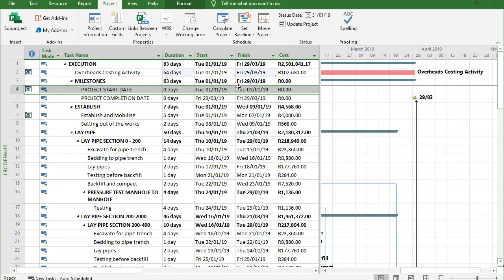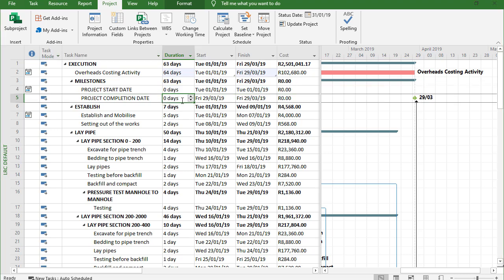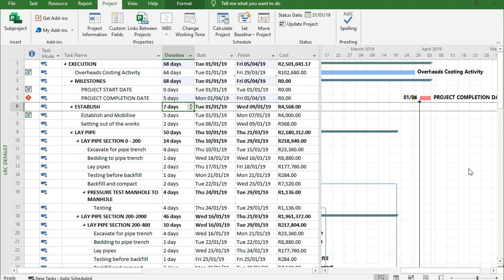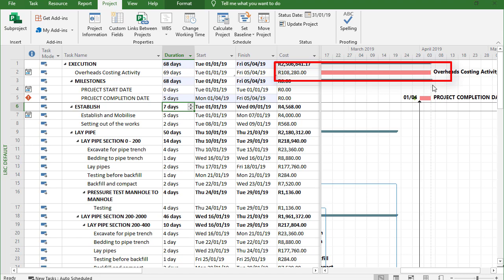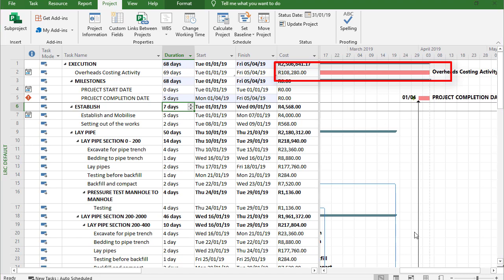And the same thing applies with my completion date. So let's say project completion is now going to take five day overrun, then you'll see the impact there. There we go, immediately adjust that activity and you can see now the difference. All of a sudden is 108,000 where we had 101,000 beforehand. So you can see the impact on my cost because we are staying longer on site than we planned initially.